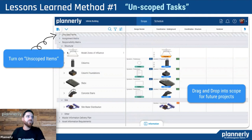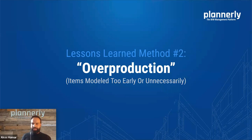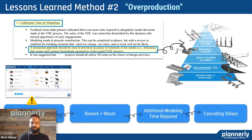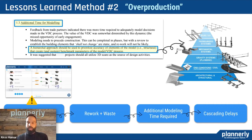Method two: overproduction. When something has been produced too fast, too quickly — with a click of a button, using BIM methodology, we can generate a huge amount of data. But if that's too early or too much, it results in a lot of waste. That's part of 'evil BIM' that we are fighting against. You might have a beautiful coordination plan in place, but if that plan is not followed, it might result in pipes, pieces of equipment, or systems placed too early, which are almost guaranteed to end up in the wrong place. So they'll need to be remodeled — which means rework, waste, additional time, and cascading problems that result in additional rework for other teams as well.